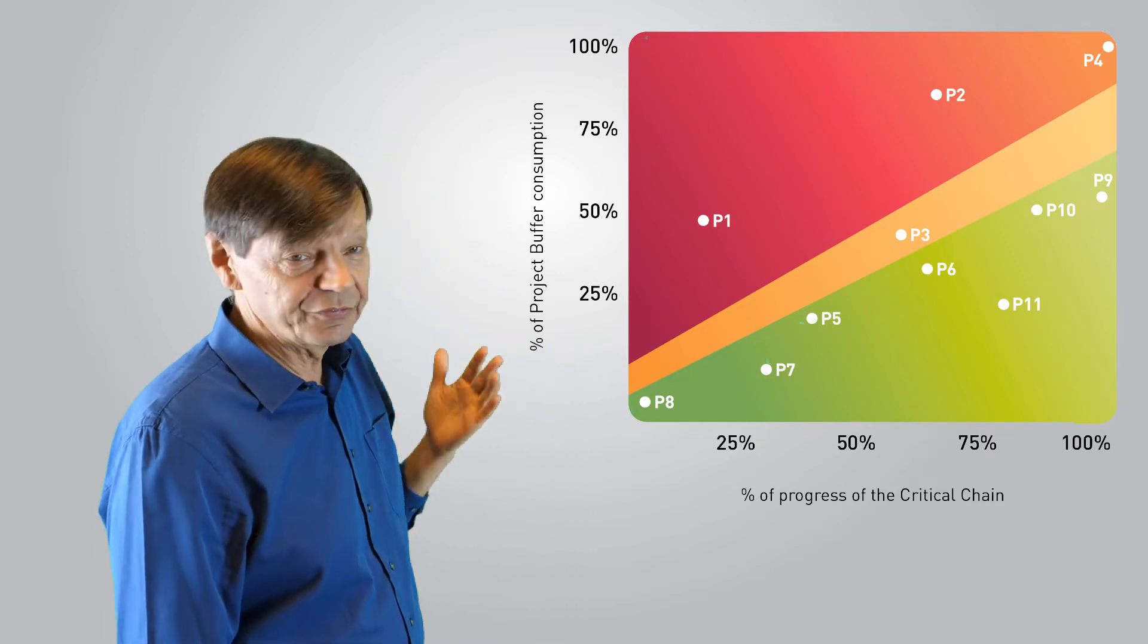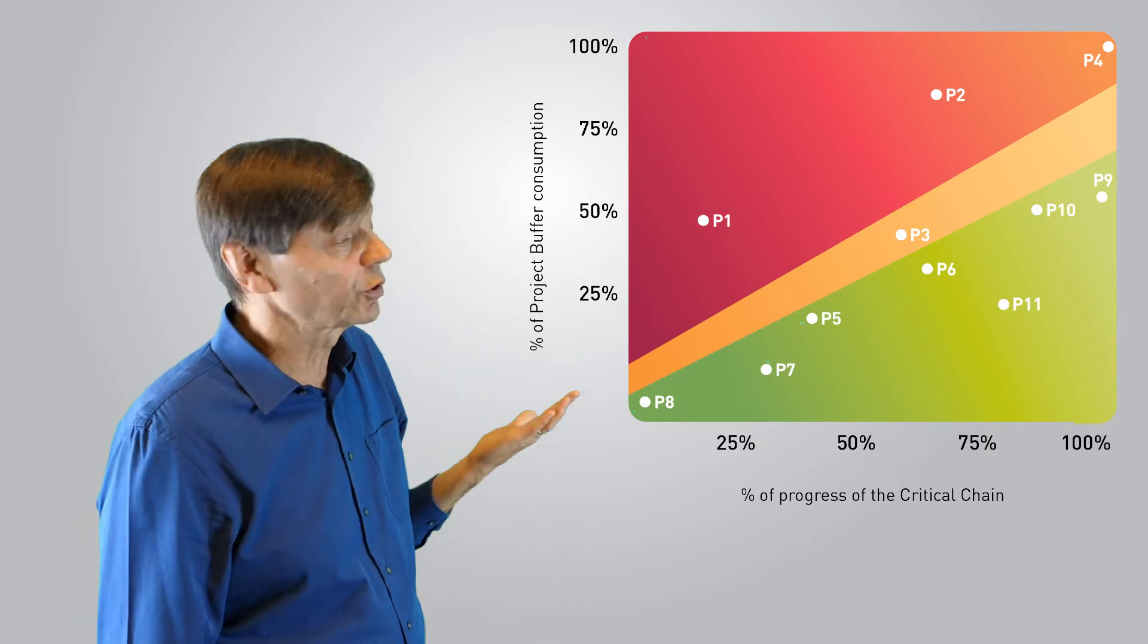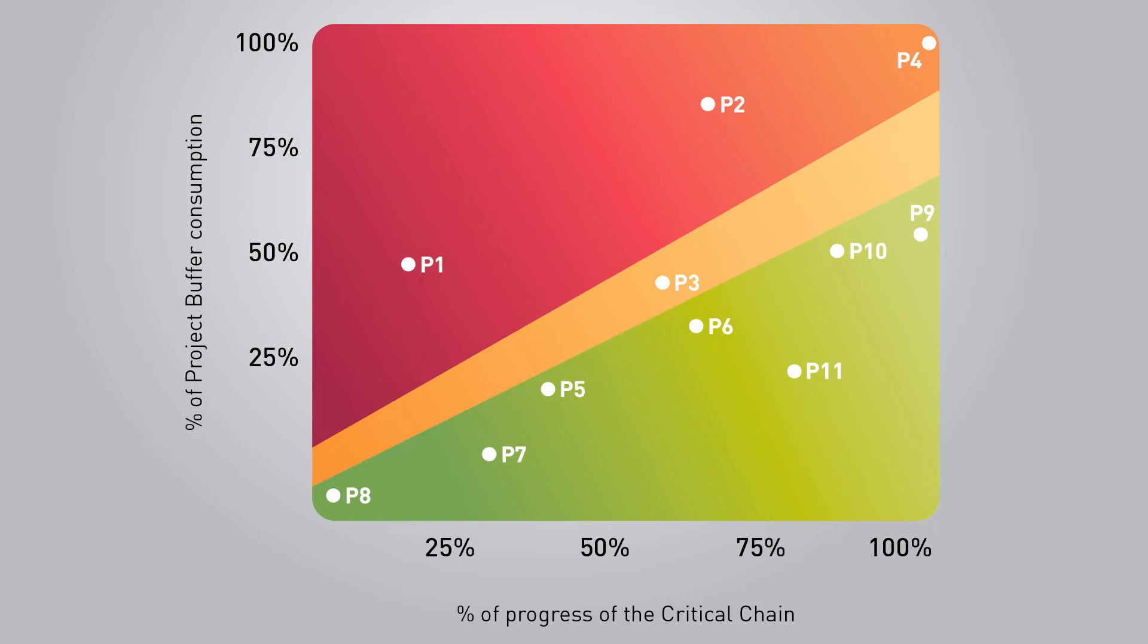So it is the project which needs the most help, and in fact the relative priorities of projects on a fever chart are defined by the slope. So number one here is the priority, number two over there is the next priority, and so forth.